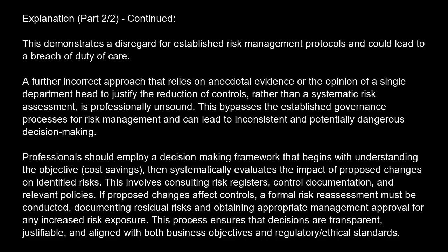Professionals should employ a decision-making framework that begins with understanding the objective, cost savings, then systematically evaluates the impact of proposed changes on identified risks. This involves consulting risk registers, control documentation, and relevant policies. If proposed changes affect controls, a formal risk reassessment must be conducted, documenting residual risks and obtaining appropriate management approval for any increased risk exposure. This process ensures that decisions are transparent, justifiable, and aligned with both business objectives and regulatory and ethical standards.